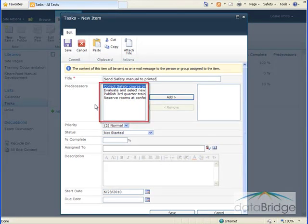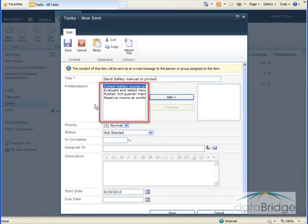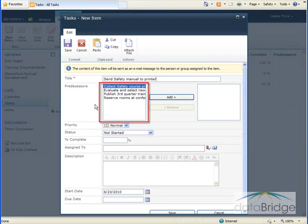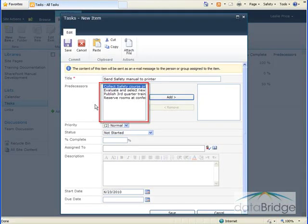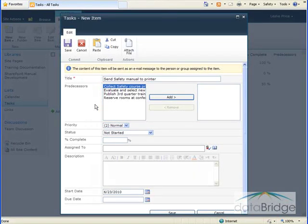In the Predecessors box on the left, you see the titles of the tasks already in the list. Within a task list, there may be a certain order to how tasks need to be completed. For example, if you're building a house, the foundation needs to be completed before the walls can go up. We don't need to use Predecessors for this task.